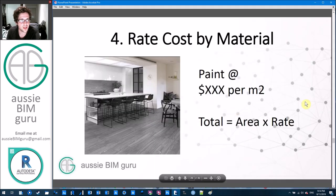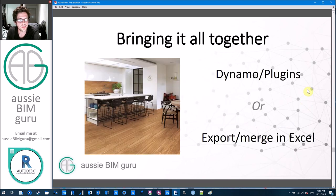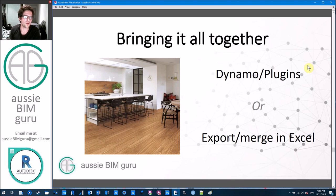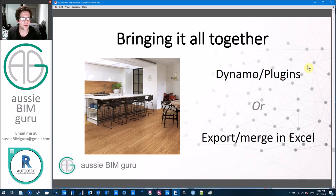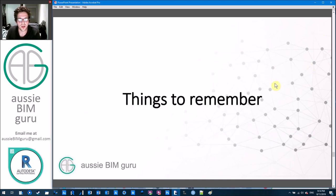That's four techniques you can use to cost your model or get quantities. Bringing it all together, you can export these things to Excel and put them together in one big file to add your costs to a total report. Or you could use Dynamo or special plugins to direct this data together and combine it all for you.